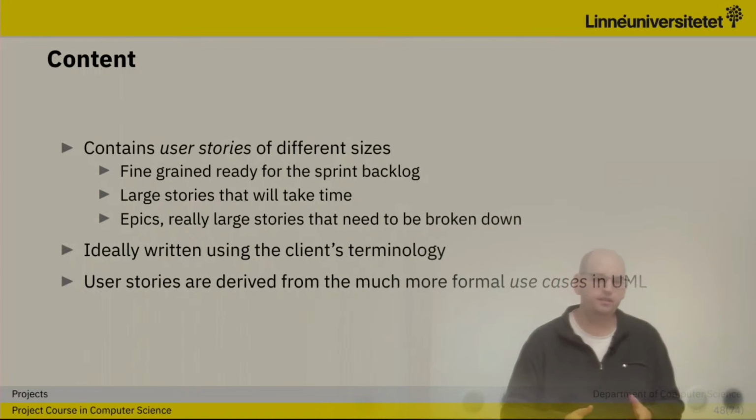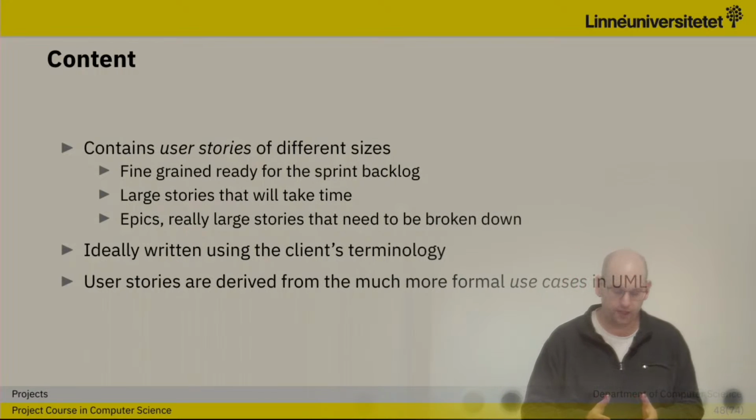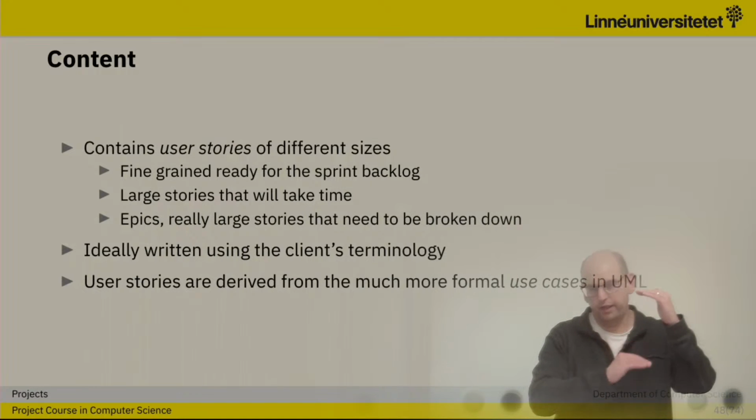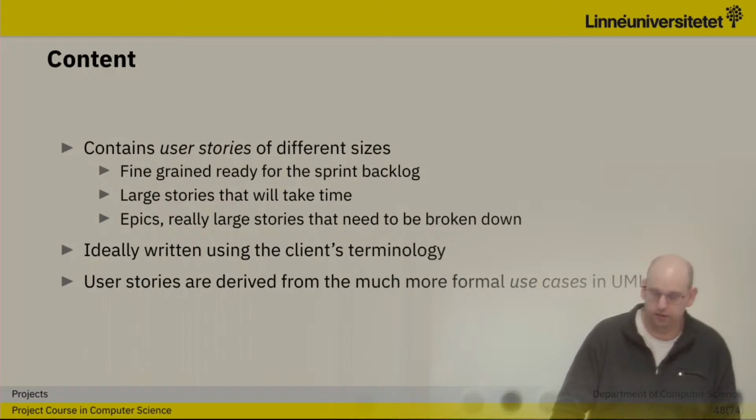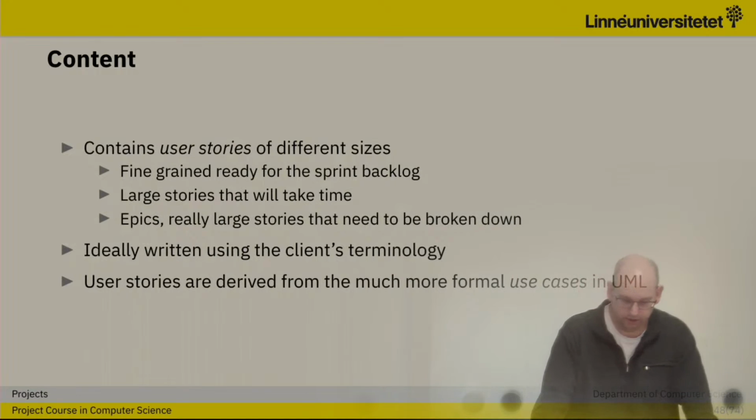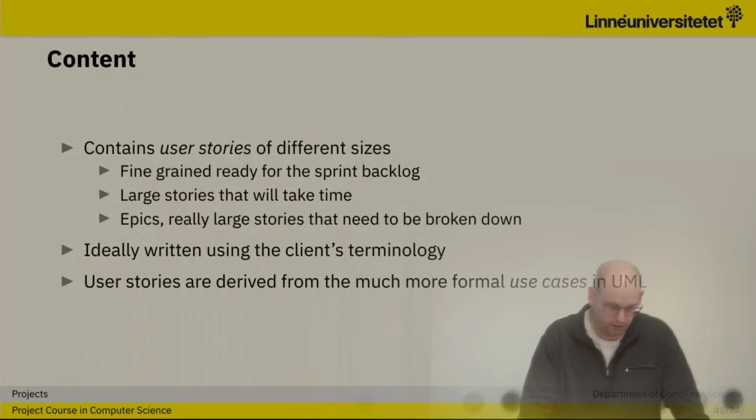Because it's a lot easier to get the customer to say how to use this rather than trying to list a number of more pure so-called requirements on the project itself. And we have different sizes, from fine-grained, ready for sprint backlog, to large stories, to epics that need to be broken down, and so on.